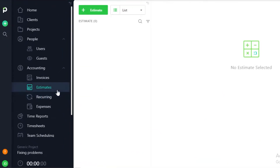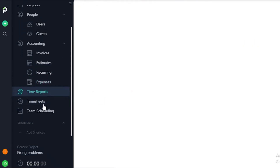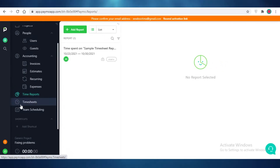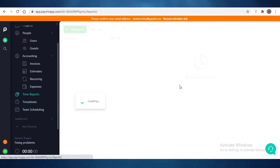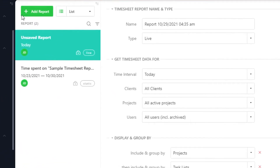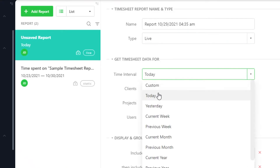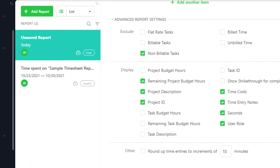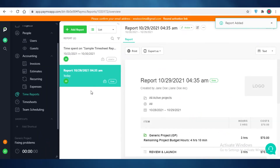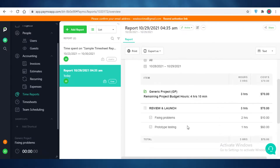You also have estimates, recurring expenses, and general expenses below that. After that you have time reports, timesheets, and time scheduling — especially useful if you're on a billable hours workflow. Click add report, choose the type of report, and save a timesheet alongside your time report. You can configure settings like excluding non-billable tasks and choose what to display: project ID, description, remaining budget hours, time cost, time entry notes, and user role. Save the report and send it to your client as an overview of time spent.